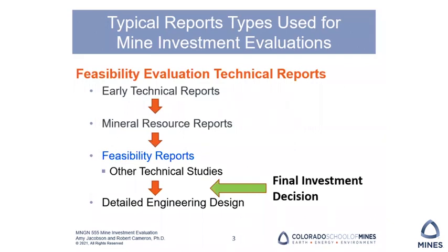If we look at the category of feasibility evaluation technical reports, we see that they can be subdivided into early technical reports. And if positive, that leads into mineral resource reports. If that is positive, then we go to feasibility reports. And after a final investment decision is made, it moves to detailed engineering design reports.